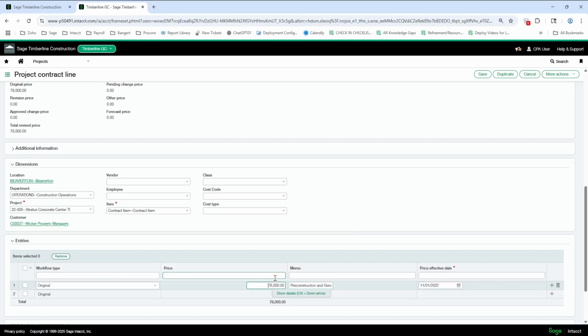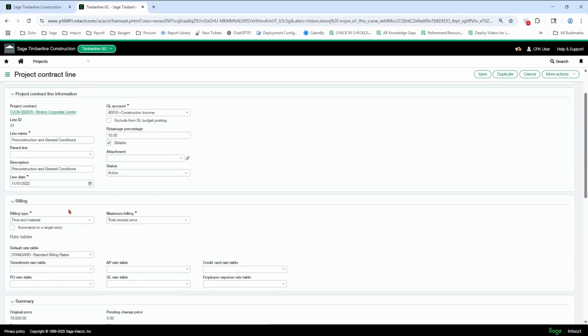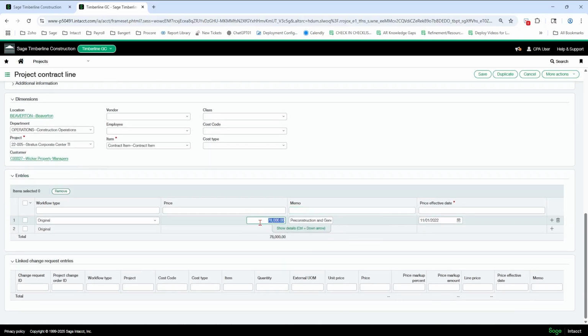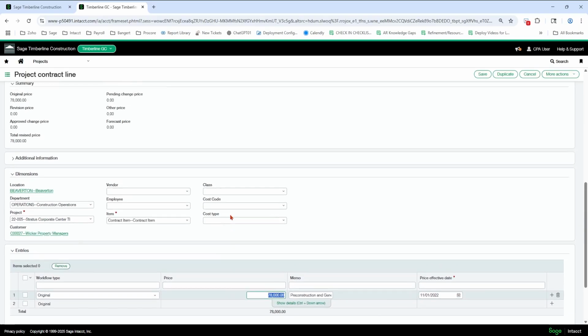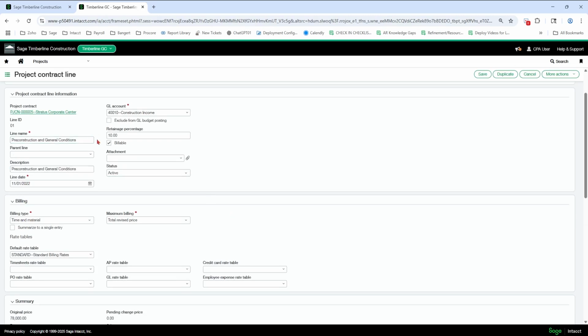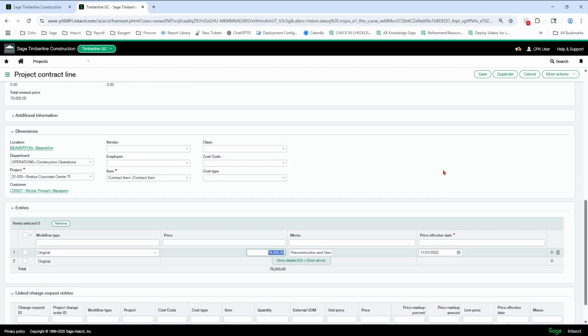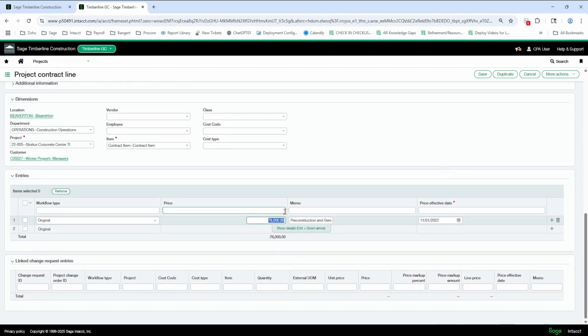If it's just going to be a pure time and material scenario, and you only want the cost to accumulate and charge a rate, and you don't care about what that comes out to, it's just pure time and material. You don't even have to list anything down here. So this specific contract that I'm showing is time and material based, and they're using detailed lines. So they're not using a schedule of values really in this scenario. They are using a detailed invoice form. Okay, so I'm going to save this and get out of this screen and show you the lines again here.